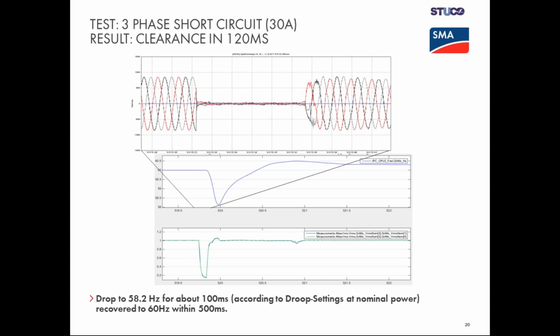Last but not least, I'll show you the very interesting UPS test, the uninterrupted power supply test. This was a situation on Friday night, 8 p.m. The party was going on, the sun was down, and we had 2 megawatt load. We skipped the smooth transition between diesel on and diesel off, and just hard disconnected the generators.